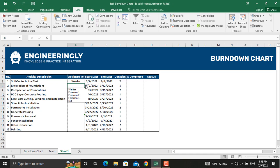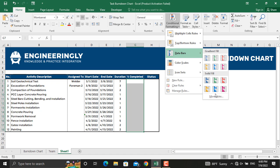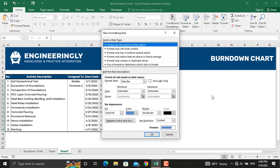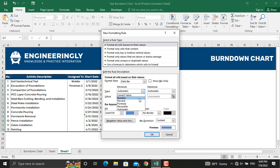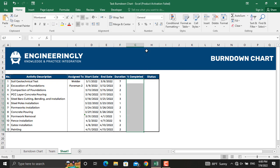Next is the conditional formatting for our percentage completed. To apply data bars, select all these cells, go to Conditional Formatting, click Data Bars and More Rules. Set the types for minimum and maximum to numbers — the minimum value will be zero and the maximum value will be one (100%). Choose the desired bar color and click OK.